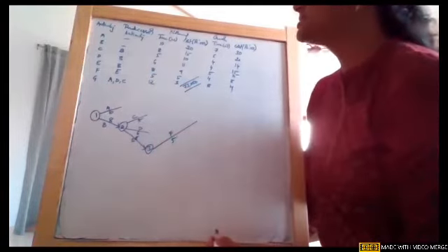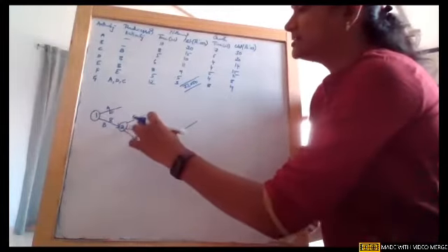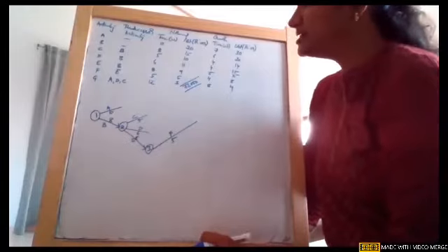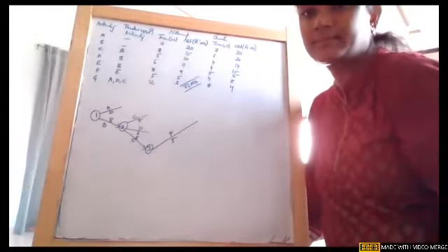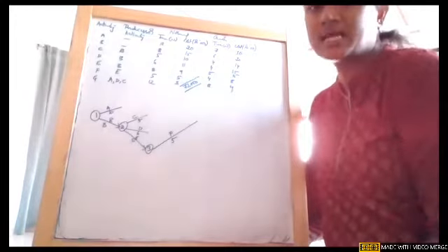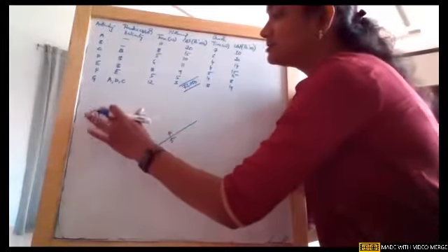And what else? A, D, and C are giving rise to G. Now, if you see, D and C are starting from the same node, girls. So I need to introduce a dummy for that.